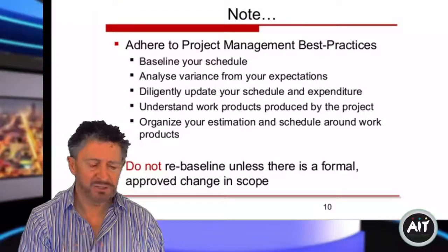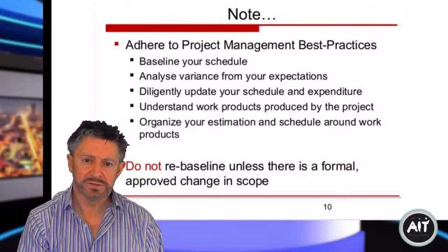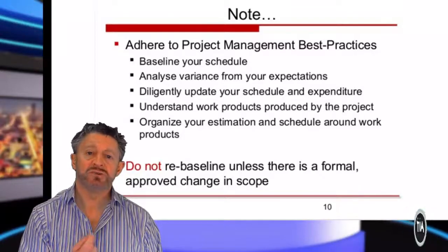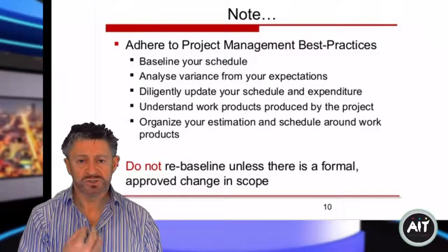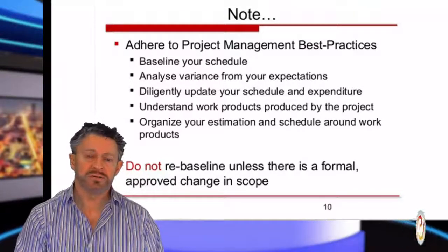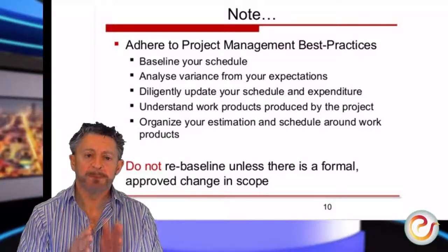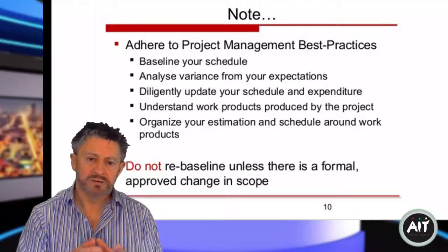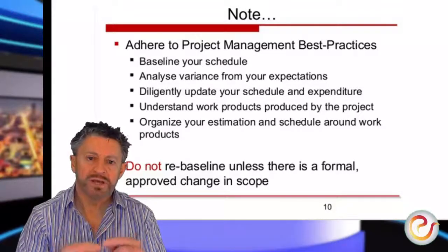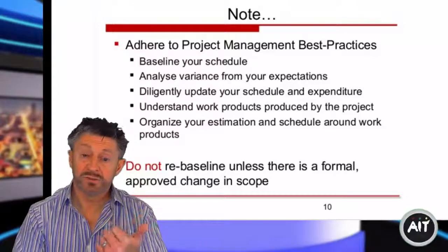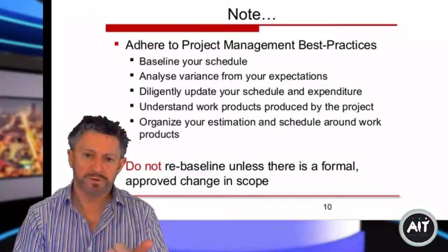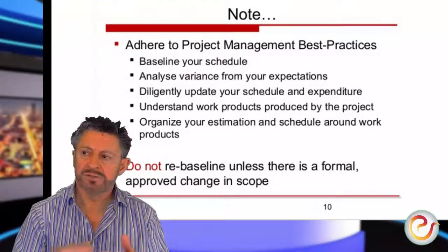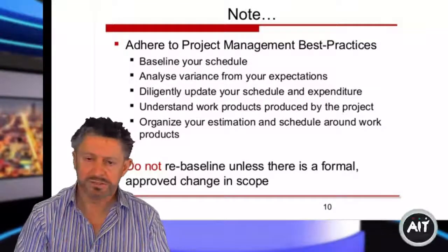Any changes have to be agreed, and the mechanism we use for that is what's known as a change request. So a change request comes in, you have to evaluate it. It's like running a little mini project. And that little mini project, you evaluate, what's the change? How much work does it involve? Is there rework? Have we to undo some of our work already? And if we have to undo some of this work, how long does it take to catch up, and how much is this going to cost us?